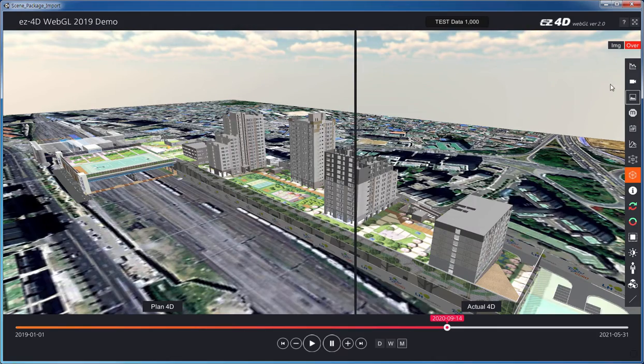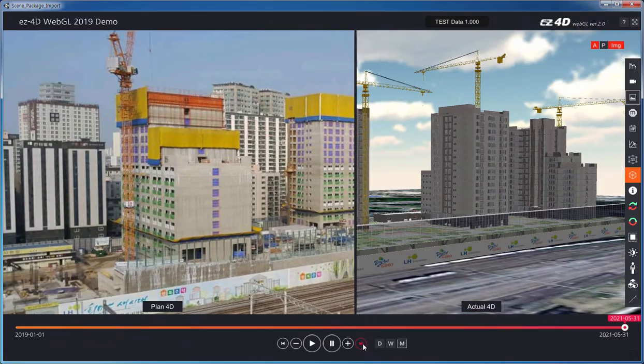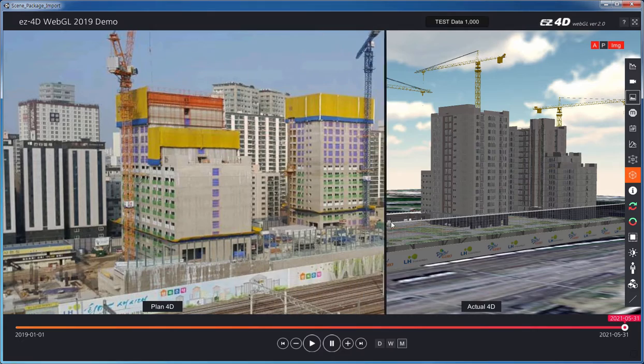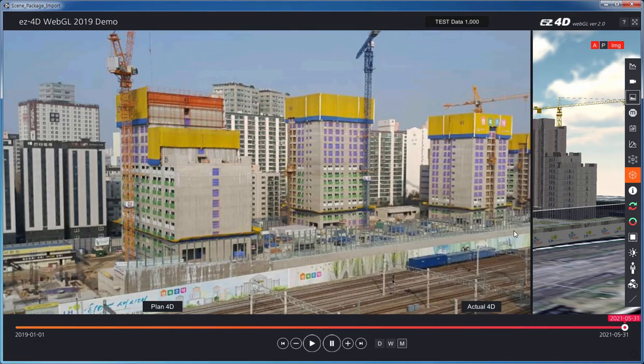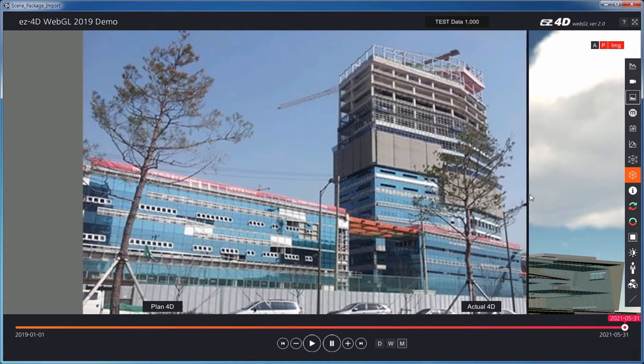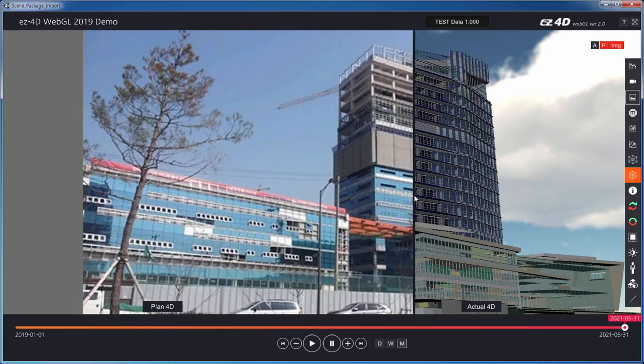Particularly through the screen overlay function, users can compare a real-time web camera with planned performance in 4D. This enables more accurate 4D management of plan versus actual progress.